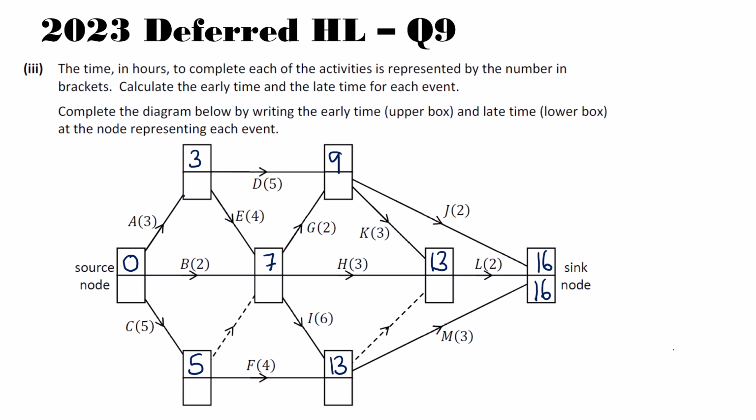So let's start with this middle one here. There is 1 activity that feeds out of it. So you're looking basically at it backwards. So we care about what's coming out of it. That was 16 take away 2, which is going to give us 14 there.